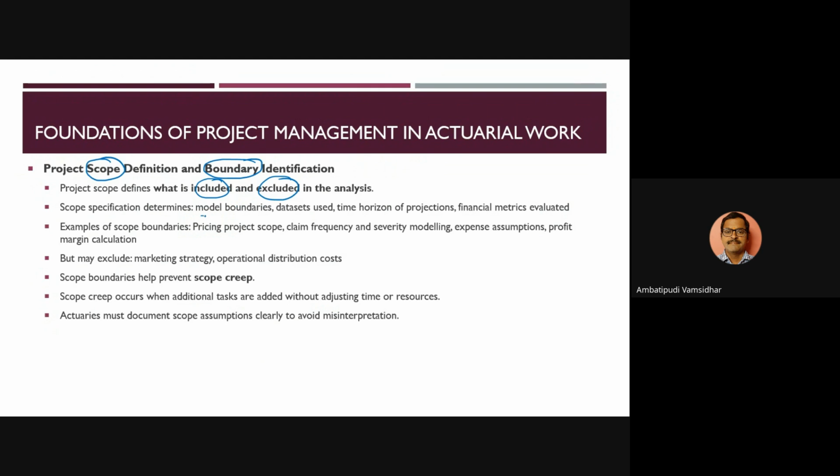You should clearly determine the boundaries of the model, which means what the model will do, what the model will not do. What is the data that will be used, right? What is the cutoff date for which this particular model will be used? What is the time horizon for projection?